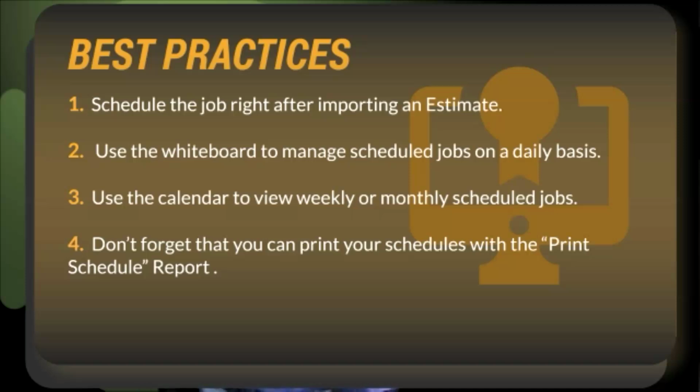Once that deposit's paid, order your materials. And once your vendor confirms your actual delivery or availability dates, then schedule the job for the day after, okay? Or a couple days later, whatever the case may be.